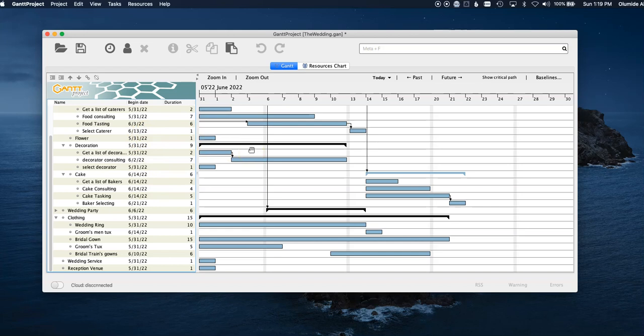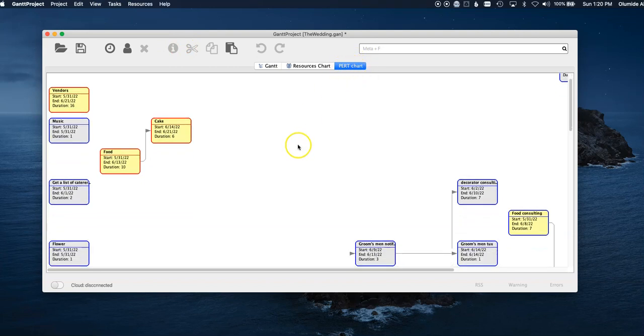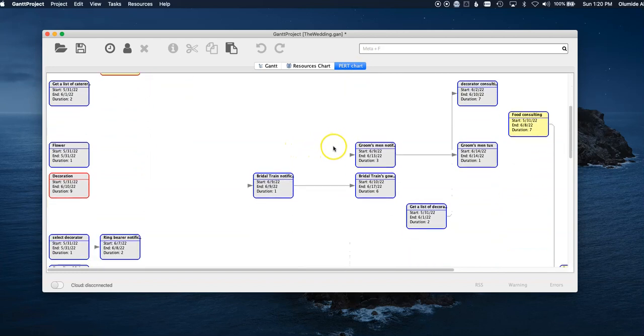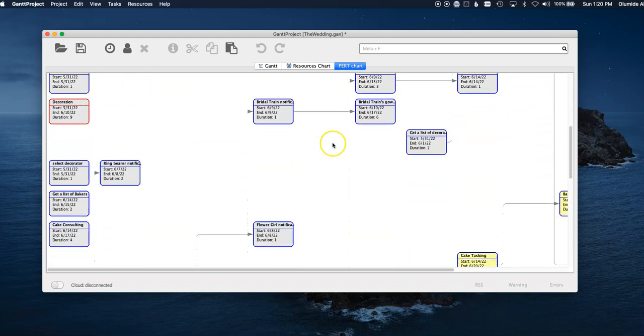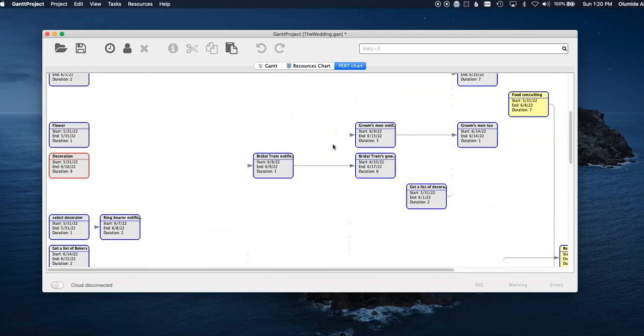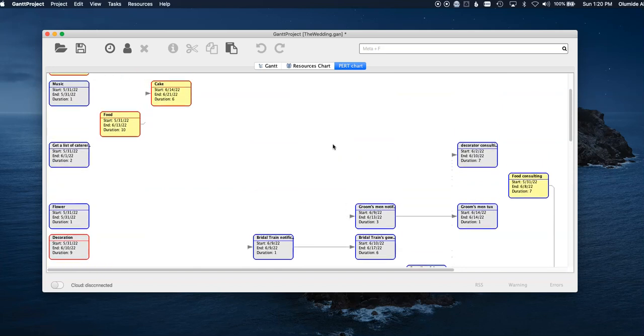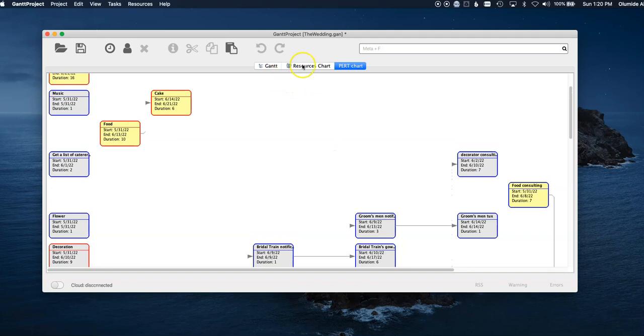The other thing that you can do here is you can view your network diagram. To do that, you come to View. This PERT chart is unselected initially. If you select it, you see there's a third button here, and that gives you a view of how your tasks are linked together and the various dependencies. I do not have all the tasks necessary for this project, so it looks like there are gaps, which, because it's still a project in progress, makes sense.